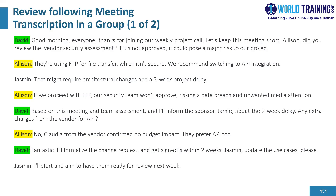David: based on this meeting and team assessment, I will inform the sponsor Jamie about the two-week delay. Are there any extra charges from the vendor for API integration? Allison: no, Claudia from the vendor confirmed no budget impact — they prefer API too. David: fantastic. I will formalize the change request and get it signed off within two weeks.